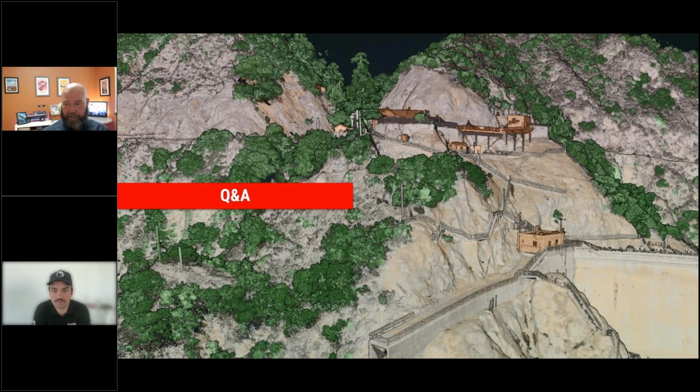Making sure you're downloading everything on the controller that you need and your maps are upgraded, your airspace and all that fun stuff, right? So I think in-office pre-flight planning for me is about a 20-minute deal. And then this site we did in East Austin, overall, the total time for that job was about 2 hours, but we were not rushing around. We did drive the entire site.